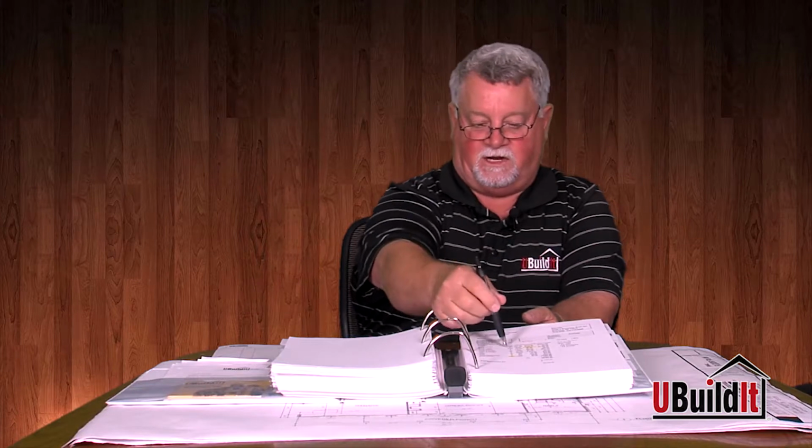We figured this particular house is going to come up with 9,550 bricks or 9,150 bricks. We advise them to add about another 1,000 onto that. We're not ordering off that number. All we're doing is finding out, we're saying, okay, we need roughly 10,500 bricks or whatever. We're just trying to find out how readily available 10,500 bricks are.